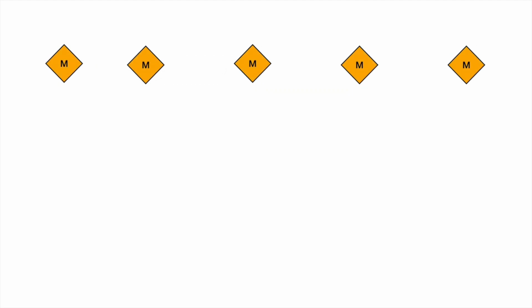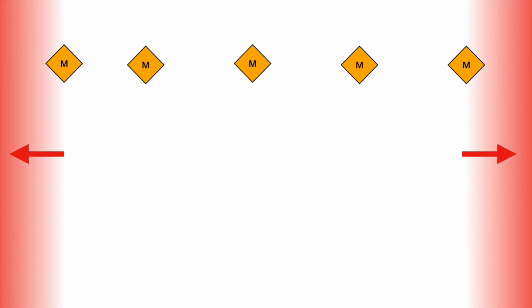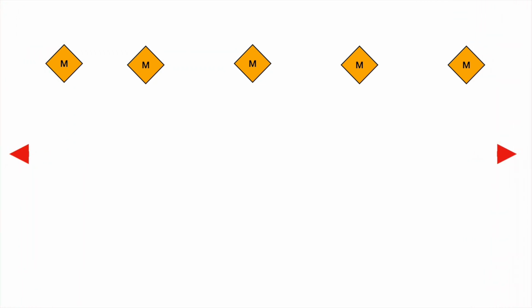It's also important to know that there might be other milestones between the two you've chosen, sometimes called planning markers, superintendent's milestones, or mini milestones that can act as guideposts for your planning session. By looking at this, we can read that this plan in front of us encapsulates the work between these two milestones. But there's also a few milestones in between. It does not show work before or after or outside these two milestones.